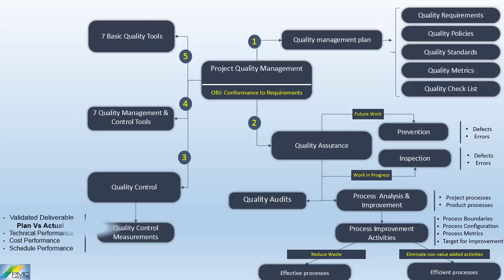The third key concept is quality control. Quality control is used to assess quality performance by monitoring the results of quality activities. The key benefits are: first, to validate the deliverables if they have met the quality requirements; and secondly, monitoring the cost, schedule and technical performance by comparing plan versus actual. The results from quality control measurements are passed to quality assurance to perform root cause analysis.